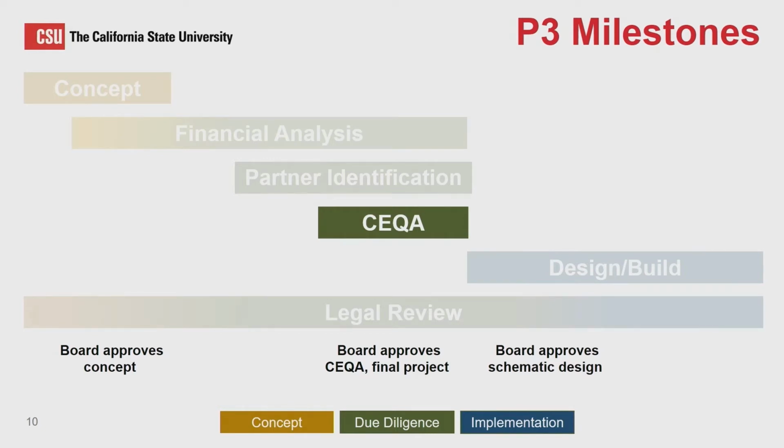And then finally, as part of the key consideration for CEQA, before the development agreement can be approved, the board has to certify the CEQA documents and approve the documents. So that's the key item. The project won't be able to move forward unless the board certifies the CEQA documents. Yeah, that's very helpful. Very complex, though, I know. And I sure appreciate the work of your team working with the Office of General Counsel and others to navigate through the complex CEQA stuff. Let's talk about project implementation.